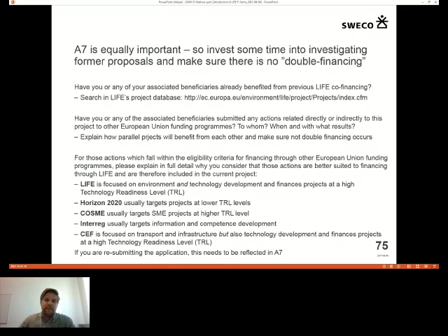But if you would get an audit on your project at some point, you would have to pay back lots of money, as well as probably pay a punishment for cheating. So there is a risk, and you should make sure that double financing does not occur.